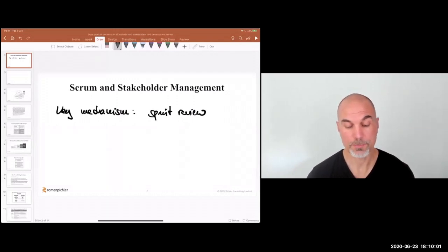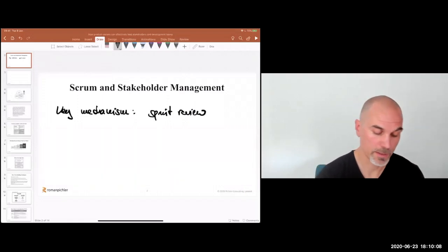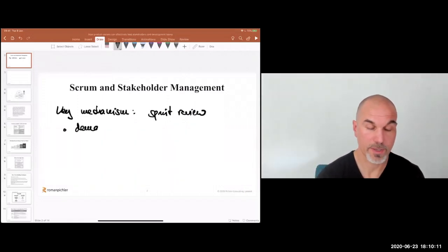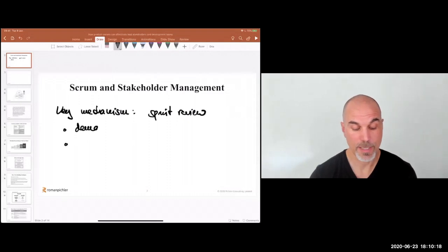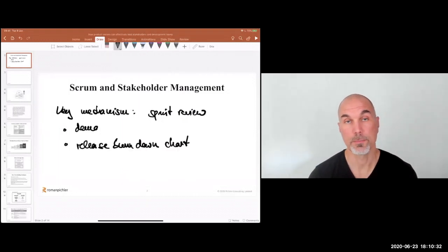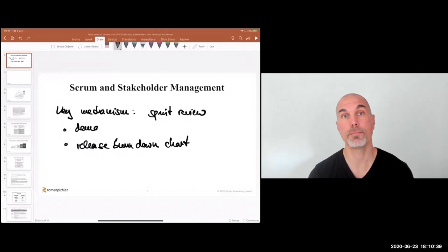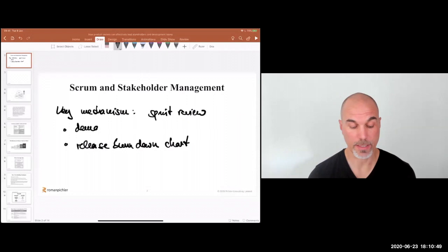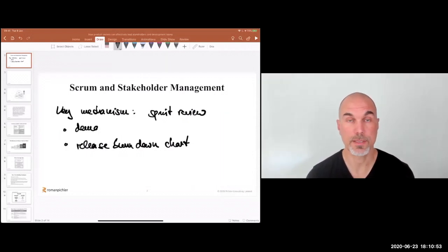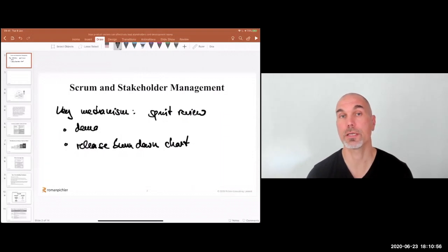A good way to visualize and understand the progress being made is not only to demo the product increment — part of that is a demo, which I find particularly valuable for internal and business stakeholders. But the other Scrum mechanism I find really helpful is to work with the release burndown chart, putting the progress of the current sprint into context: are we on track, are we off track, are we able to meet the desired release outcome on time and on budget? That creates transparency and allows us to collect feedback and hear concerns and ideas from stakeholders.